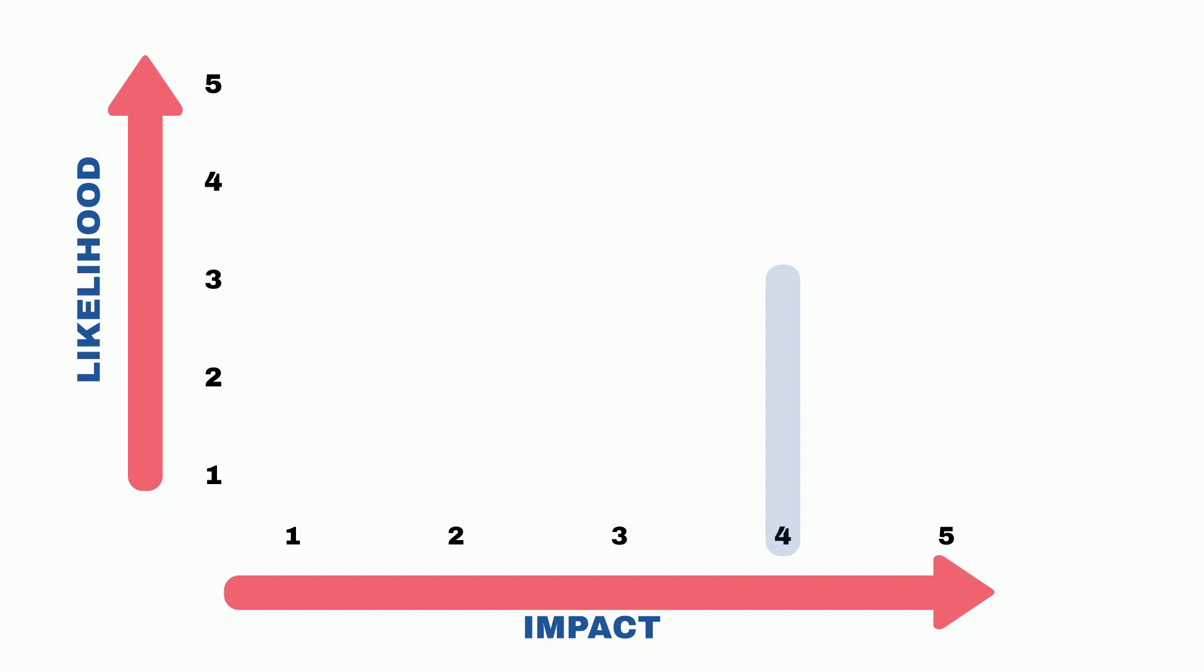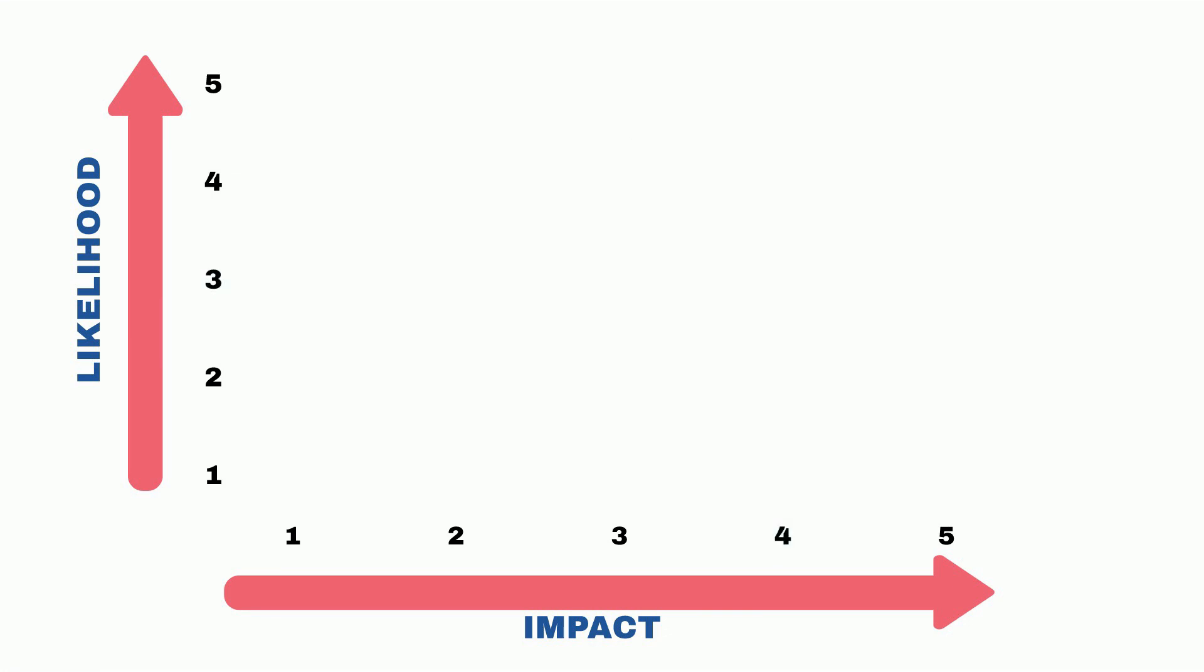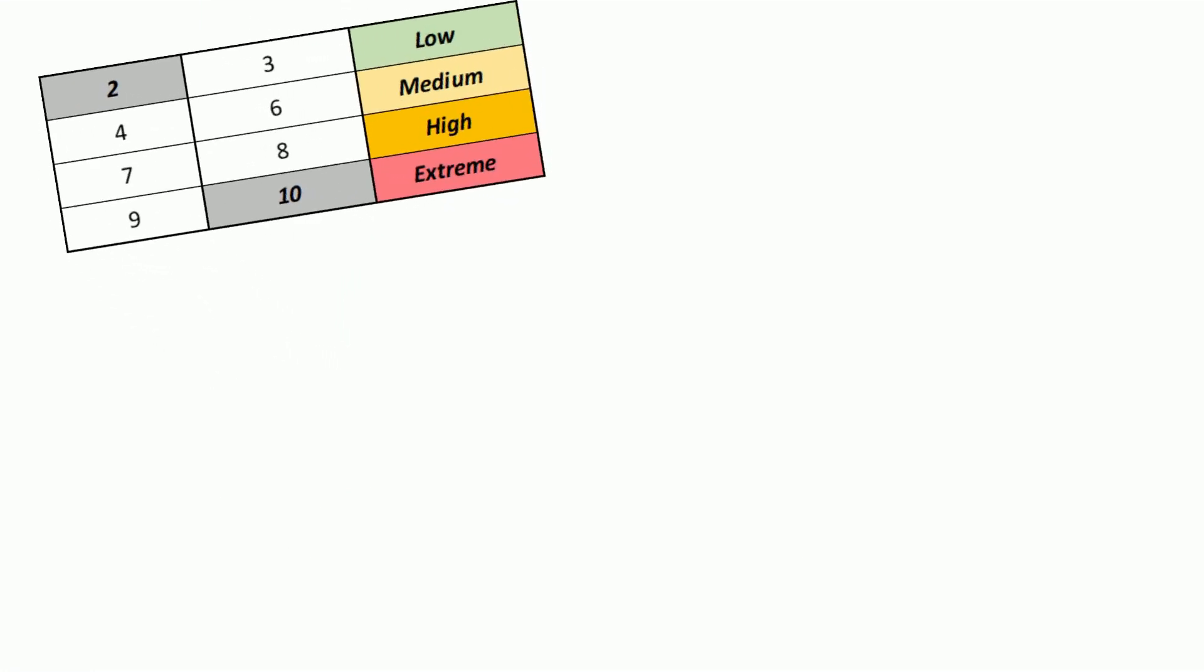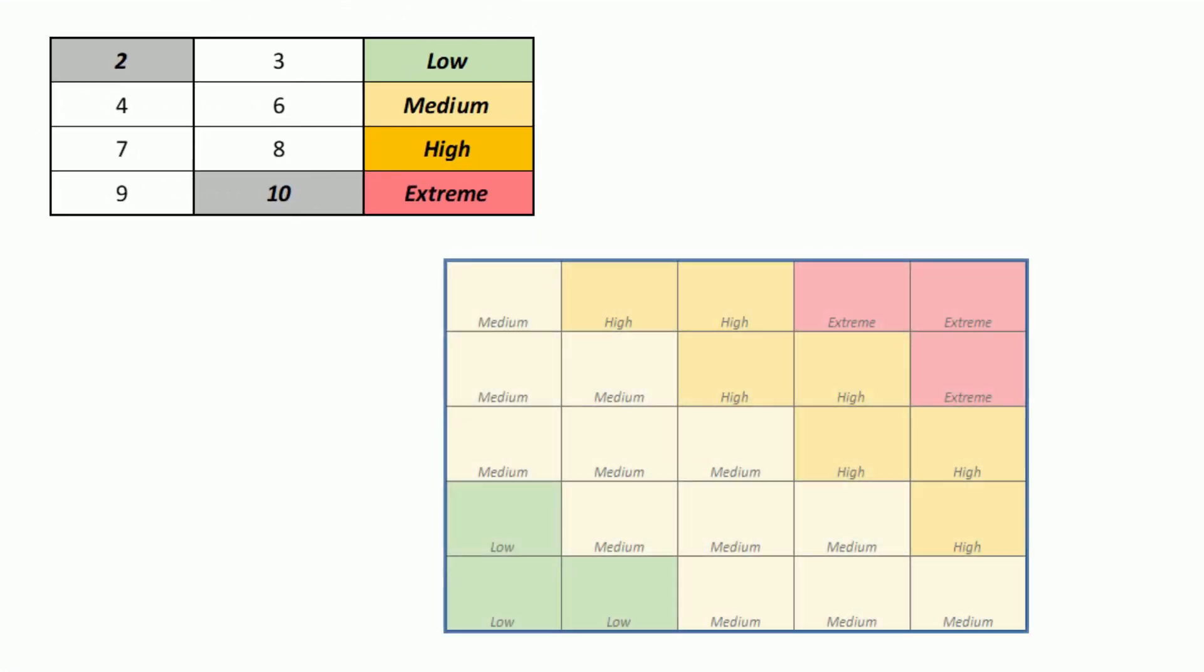For instance as a way to assess severity we just add those two numbers and that gives us the severity rating. The severity rating goes from 2 to 10 which is the maximum in this example. So all we have to do is just assign a description to this rating. For instance from 2 to 3 we say the severity is low, from 4 to 6 we can say it's medium, all the way up to extreme.